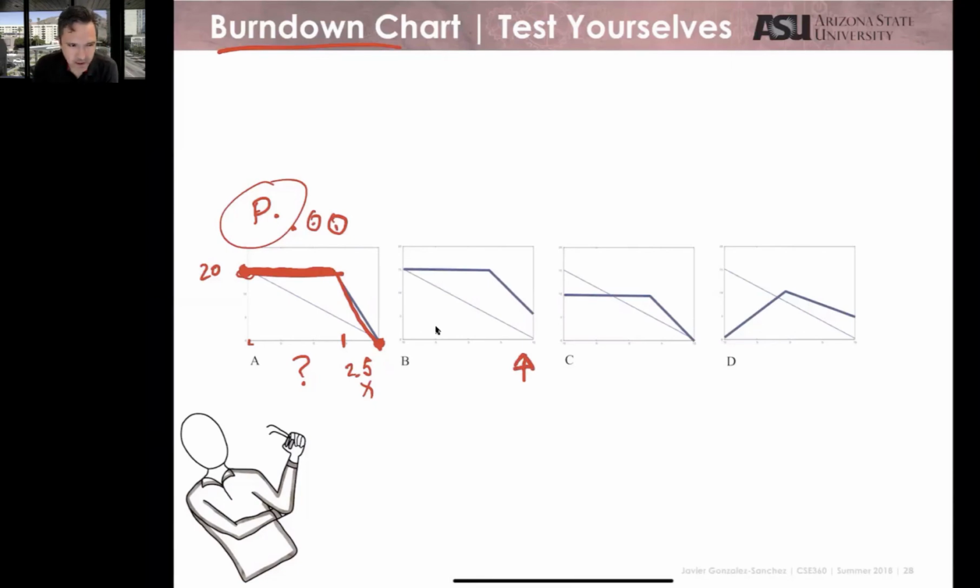Case B. What can you tell me about the B? There is also some kind of procrastination here. Again, this is Agile. What happens if you do not complete something? Nothing, because basically you move that something to the next sprint. I mean, it's like we select this to do these 2 weeks. We didn't finish. Well, we can move this to the next week, right? This is always an incremental process.